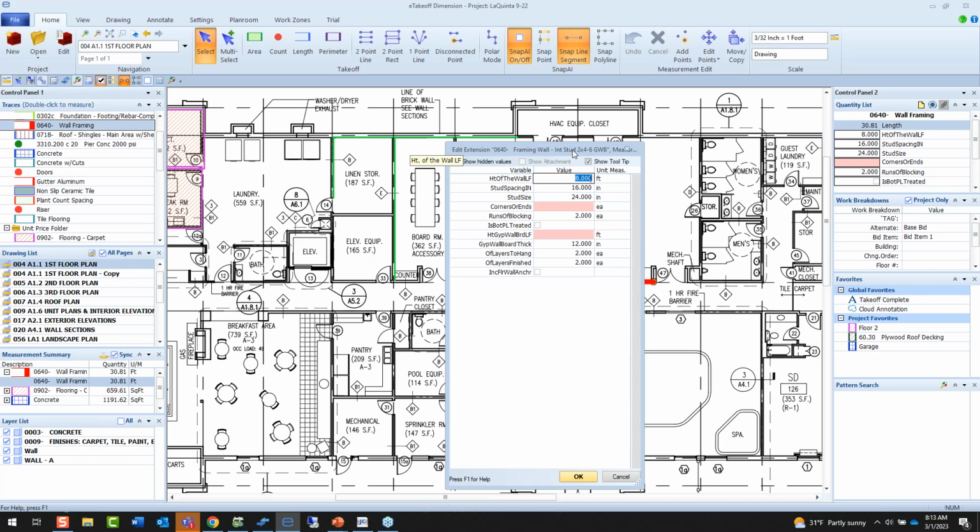So I've got this variable list specific to this takeoff. I want to make stud spacing. Those item tables back up those variables. I want to make a choice between 2x4, 2x6, 2x8, if you will, and make that choice right there. We'll put in the number of corners and we'll generate some drywall from this as well.